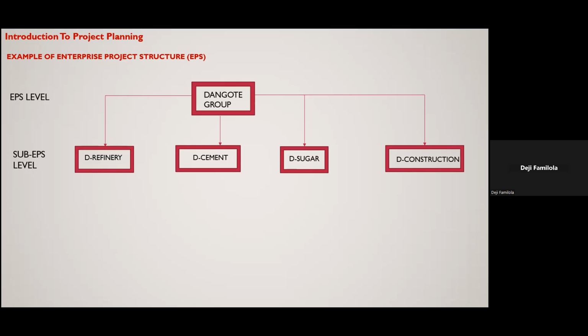But that is in the case of eventuality, like somebody falls sick, which could happen, and if things get delayed, and it could, if the job that person needs to do is on the critical path.